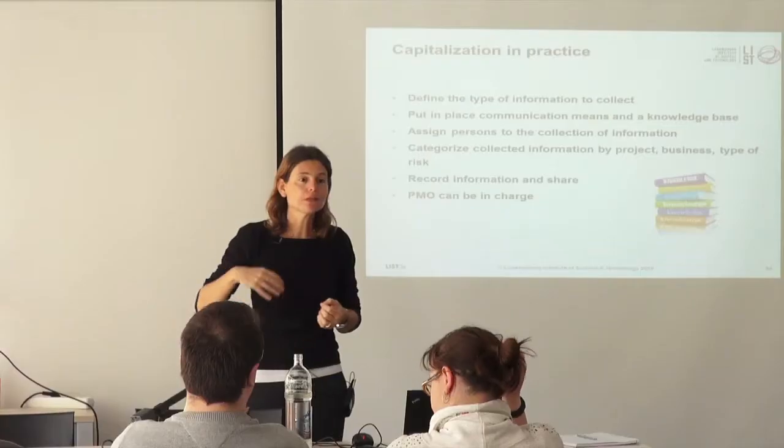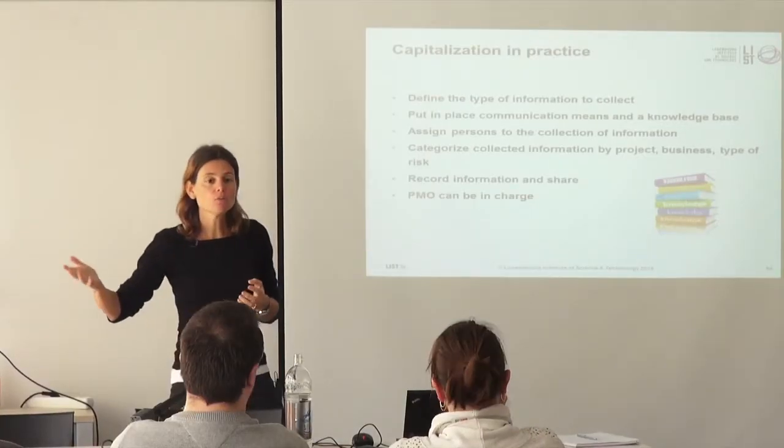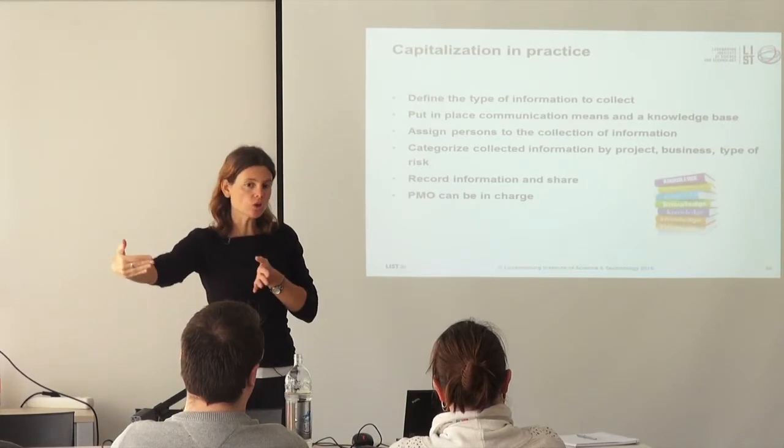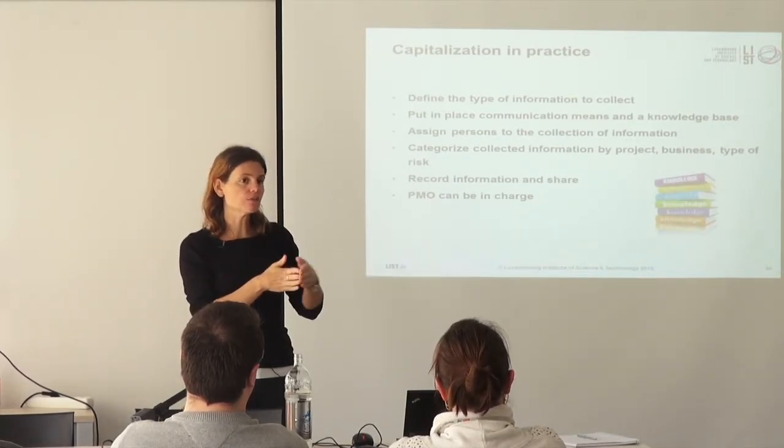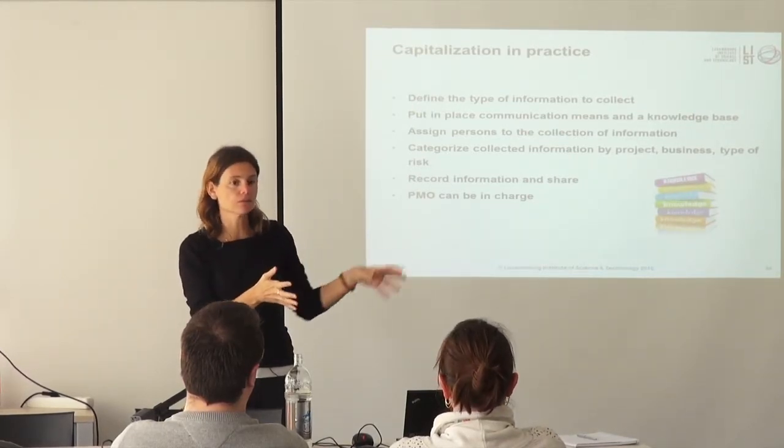So once you have collected from that project, a second step, we're talking good maturity in project and risk management here. But if you want to go really the full stuff, then at some point you have collected all this information and you are going to categorize that so that anytime a new project starts, they would know, okay, we are so close to that other project that we can use this risk from that category.